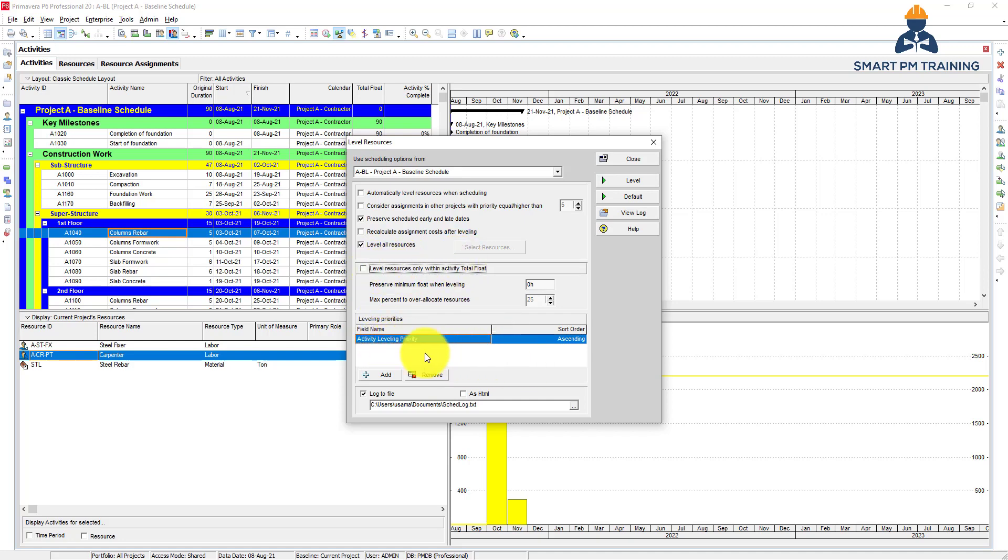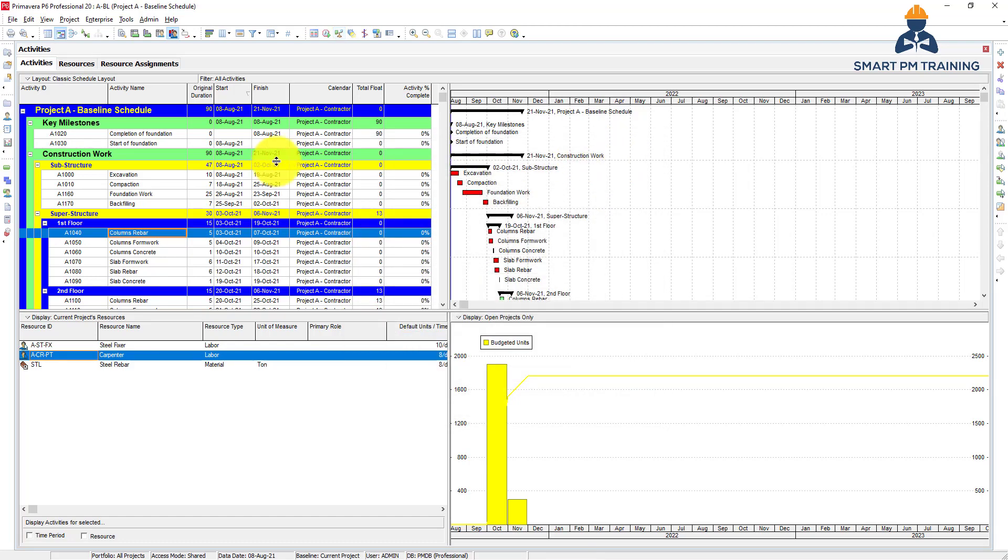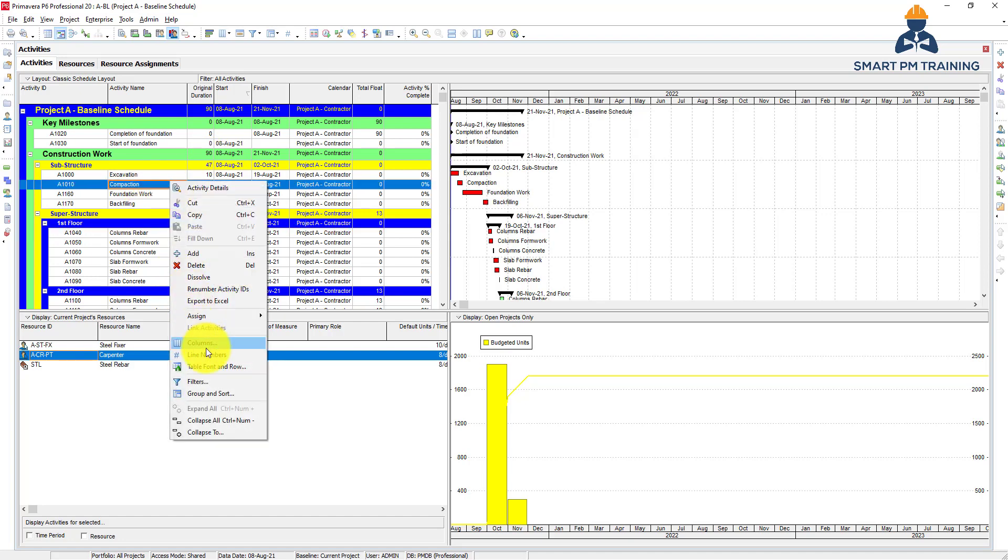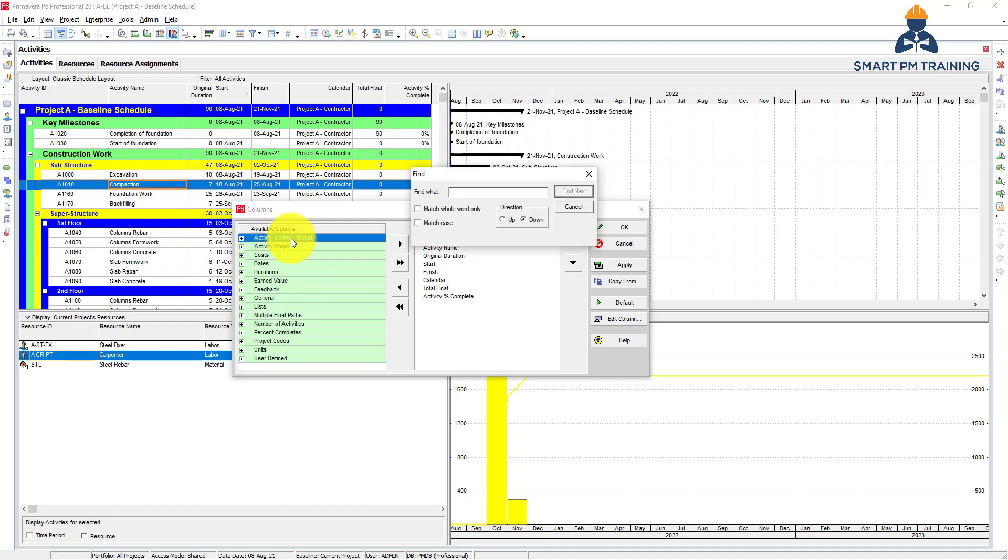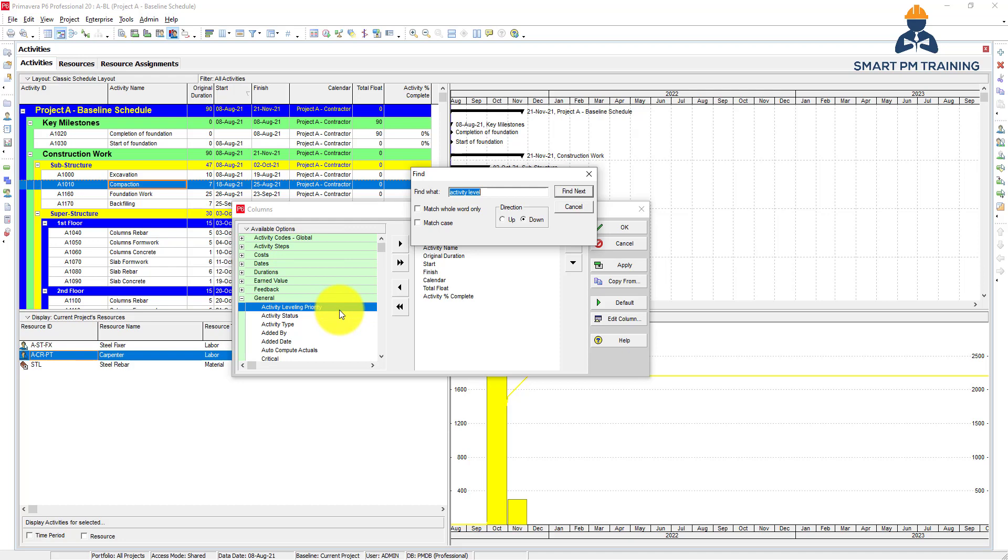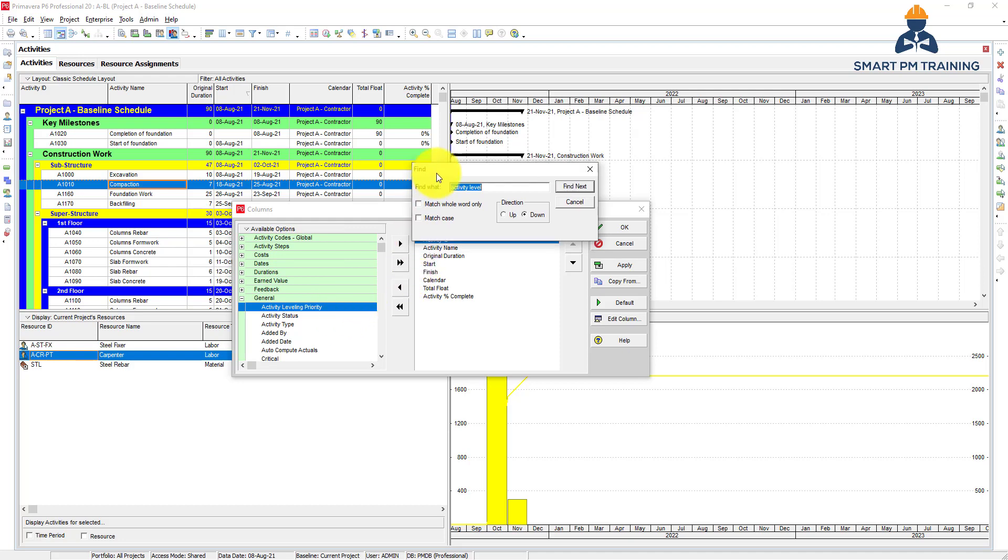The activity leveling priority is also a huge factor in leveling. For these activities, right-click and choose Columns, then search for Activity Leveling Priority.